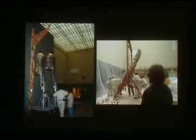Well, now it was time to move all the rest of the big objects into the temporary storeroom. For these works of art, the Metropolitan has an excellent in-house team of riggers who are always busy moving objects throughout the museum. Some advanced planning was necessary to make sure the riggers could be available to move our objects at the designated time, as dictated by the construction schedule.